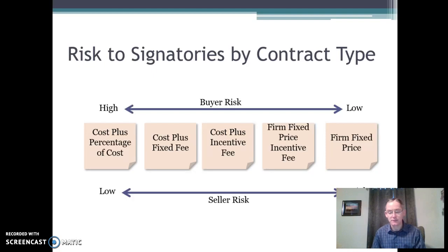There's no way for them to come back and negotiate. So they have got to deliver on whatever that firm fixed price is. So you put yourself in the position of great for us, risky for them. So what's going to happen? Those firm fixed prices generally tend to be a little bit higher because they want to cover some of that risk into their cost.